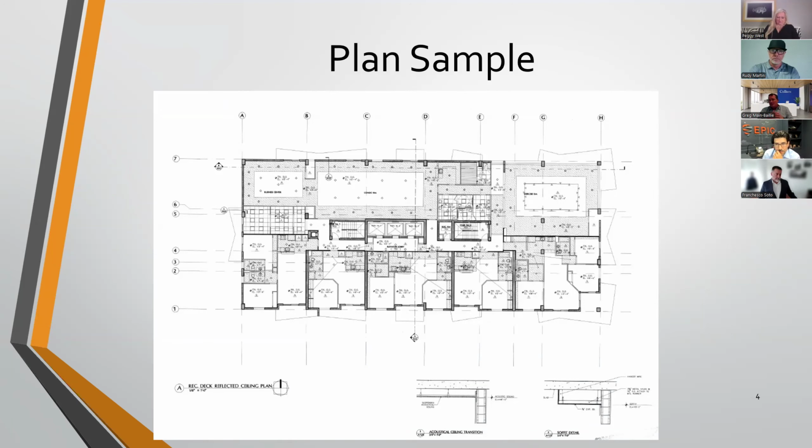So extremely important. As you can see from the set that's on your page, typically they will come as a dated set with a revision, so that the contractor can then submit a pay application based on the drawing set and physically what he is putting in place. And if he comes into any unforeseen conditions during that process, as Ben mentioned, those are annotated, those are logged and submitted as part of your monthly pay application.